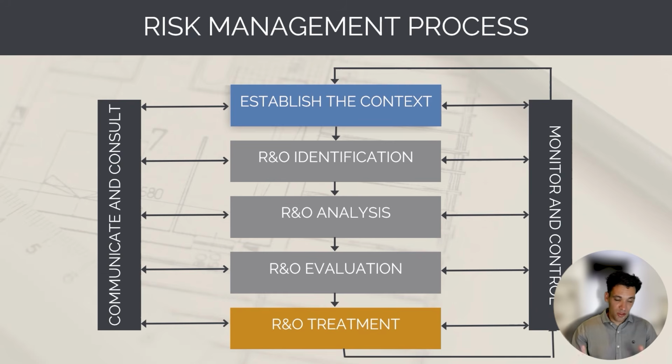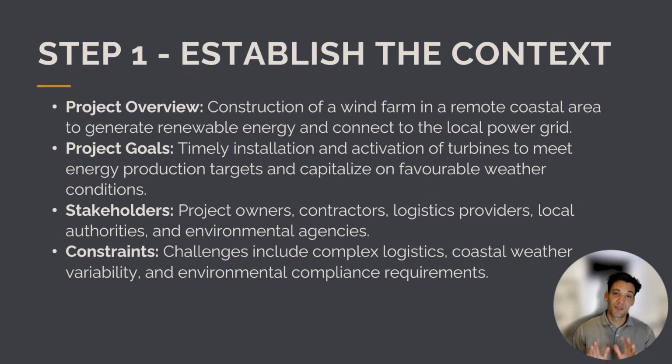We need to establish the context. We need to identify the risks and the opportunities. We need to analyze these risks, we need to evaluate them, and then we need to treat them. Okay, so step one, we need to establish the context.